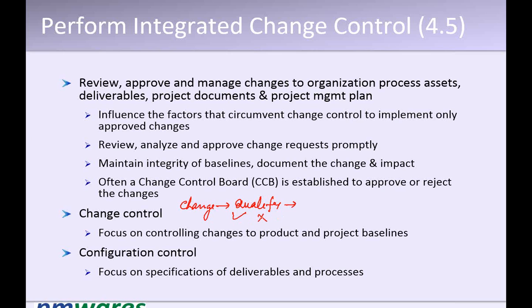How do you decide? If the change is in line with the project charter or not. If the change is adding value to the objectives of the project or not. If the change is adding value, if it is in line with the charter, you should take it. If the change is not in line with the charter, you should reject it, saying that it is not in line with the charter, we cannot take it.